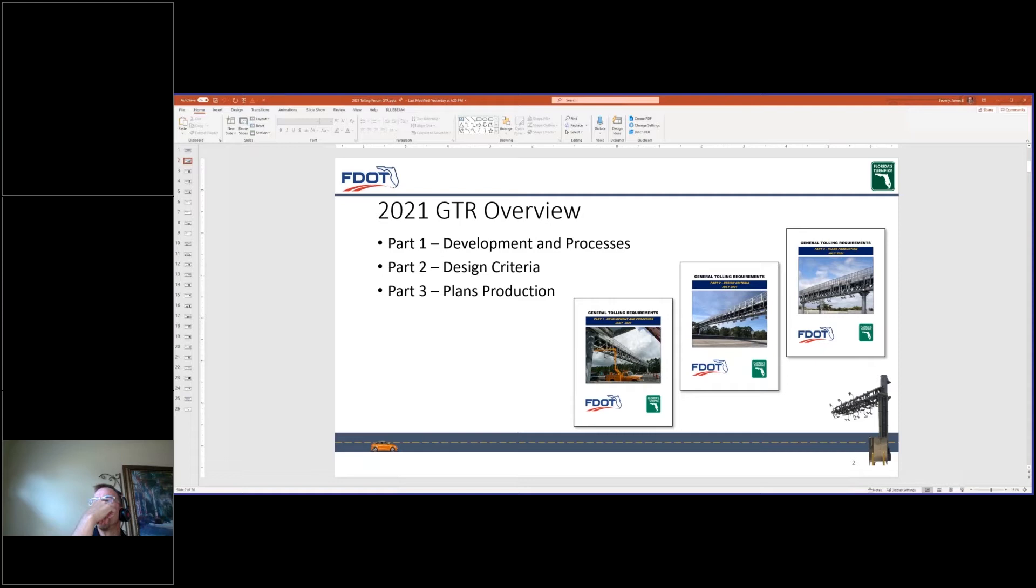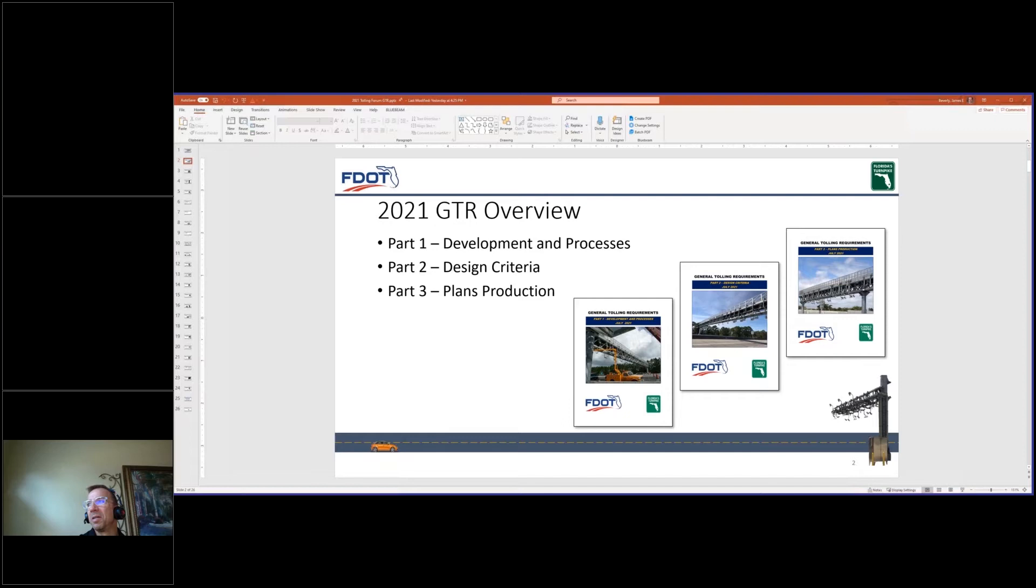Part two, design criteria for developing FDOT toll site design plans and calculations. Part three is plans production, defines the sheet number and component requirements for each toll site design. This part also describes the level of design such as preliminary, complete, and final in which the milestone phase each component is required.